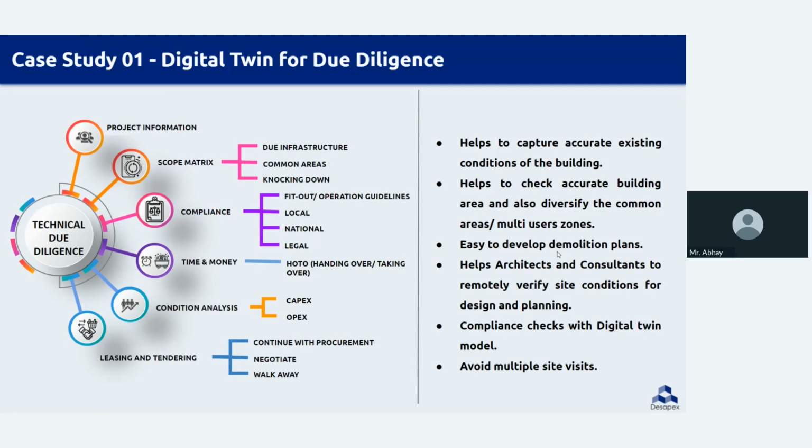Let us discuss what the steps involved are and how we used BIM to give our clients an accurate output. The very first step, which you can see in the image, is the project information. Collecting the right project information will help to do the right checking. So we used laser scanners to scan the entire building. One benefit of doing this is that my design team doesn't need to visit the site and spend days to capture the data. The survey team will bring the data to their desk and they can measure, review, and verify all the elevations remotely, anytime they require.